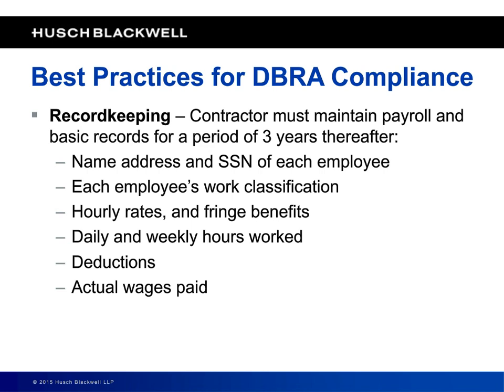You have to keep the statement of compliance. And again, you have to keep those items for 3 years. My recommendation, because I've not seen authority to the contrary, is that you keep them for 3 years from when you complete construction on the project, not 3 years from when that record was generated. So those are the things you absolutely, by law, have to have.